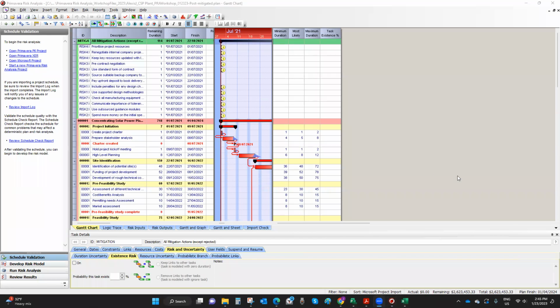So is there a way to add them to the Microsoft Project file? Unfortunately, Microsoft Project does not have this feature to add a link task to it. But what you can do is add Primavera Risk Analysis as an add-on to Microsoft Project, because they're compatible, and you could add it to Microsoft Project, and it becomes just like a feature in the software.